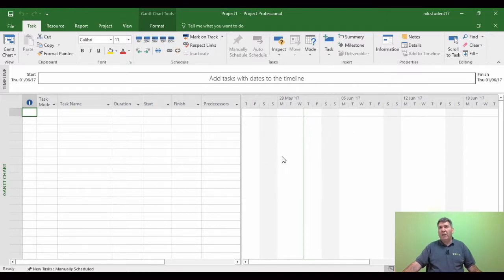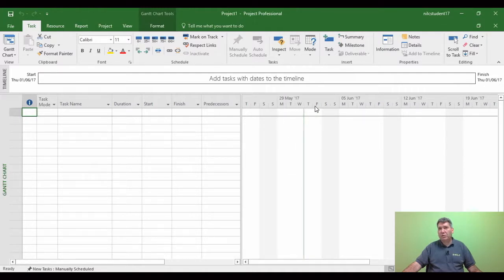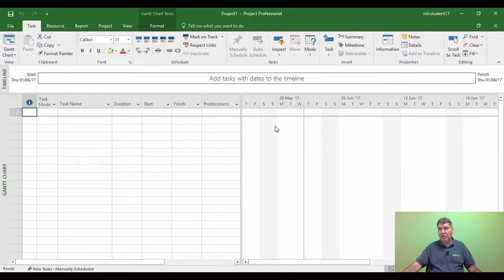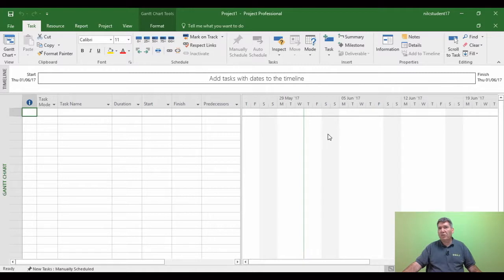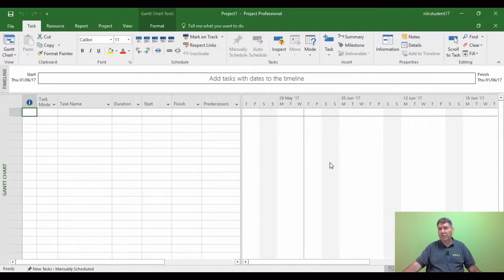Now within Project, the working week is naturally set from a Monday to a Friday by default. So the white means the working week and working area. Project calls it working. Now the grey is known as non-working. So Saturday and Sunday, the S and S, that means non-working. So that's the default of Microsoft Project.